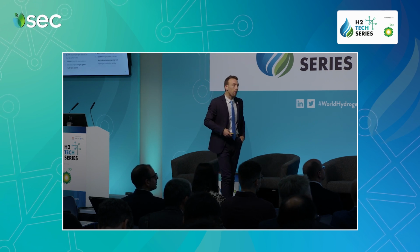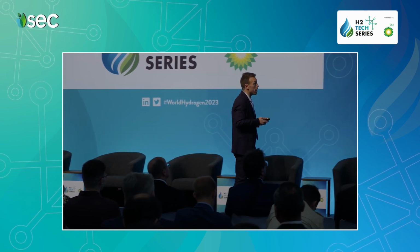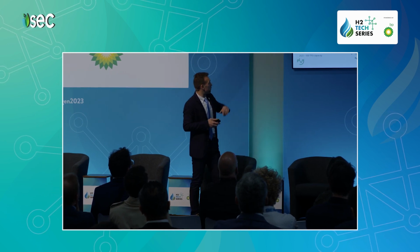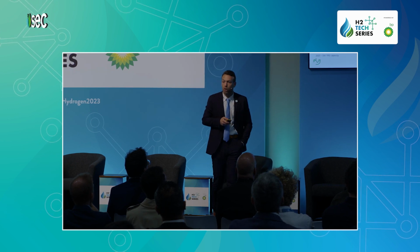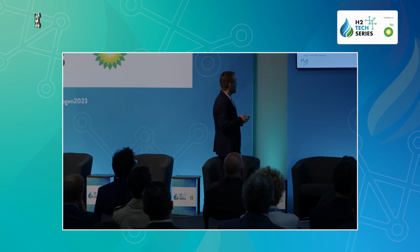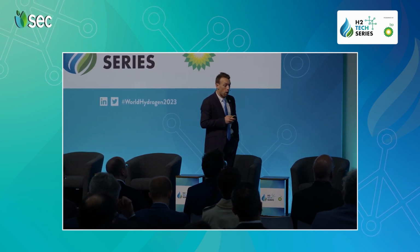So some large-scale projects that we are currently doing, and I really invite you to go on YouTube, watch the video. We have the 45 ton per day green hydrogen capacity project that we are doing in Georgia. That will be the largest plant in the US that will be operating. The first step is 15 ton per day of liquid hydrogen with a COD, so start of operation and end of commissioning in Q2 2023. So in the snap of finger, in 2 months. Very, very exciting to see this project.